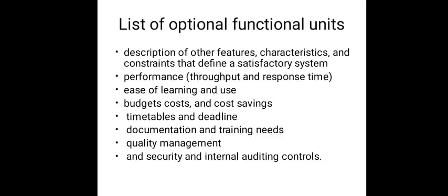These issues should be reviewed with the customer at the end of each phase. The assumptions need to be reviewed also at the end of each phase, but the customer might not always be the correct person for less important ones. Assumptions and issues apply to all artifacts but are particularly common for non-functional requirements.